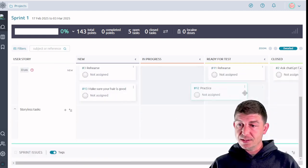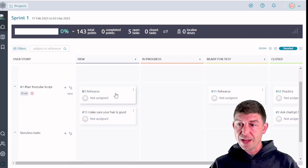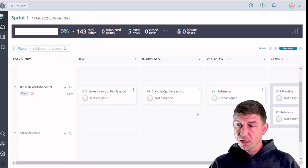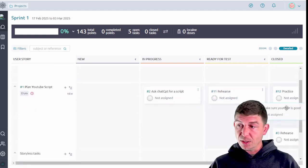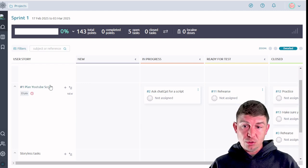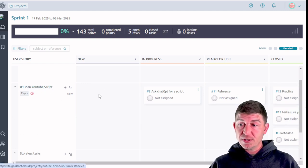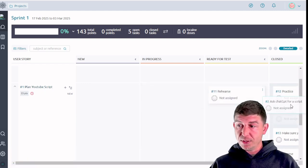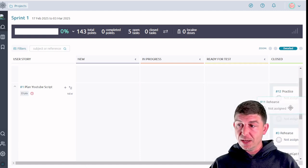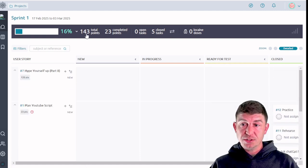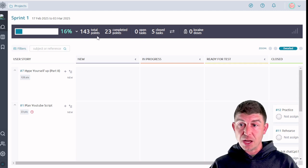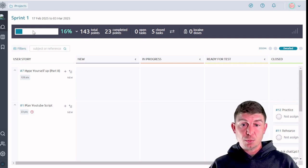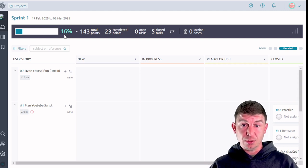Now as this sprint moves forward, you're going to move all of the subordinate tasks through the various levels of completion. And as these tasks get closed out, what I'm going to do in order for this plan YouTube script user story to get completed, all of the subordinate tasks have to be done. And when I drag the last one in, you'll see that the totals up here at the top, the total points and points completed have changed. So in this sprint, we're 16% complete with this particular sprint.